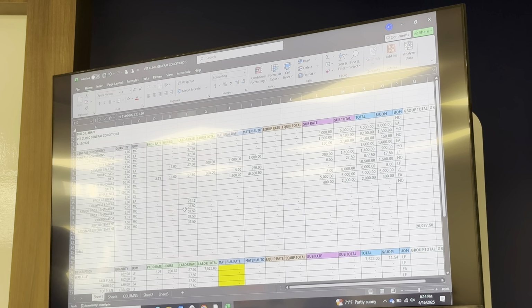Plus labor burden, the way we have this run. And then times, say, a labor burden rate of 1.5. Okay, and I'm going to pull that down. Now all I have to do is adjust the salaries. Let's plug him in at 100. Let's plug him in at 70.